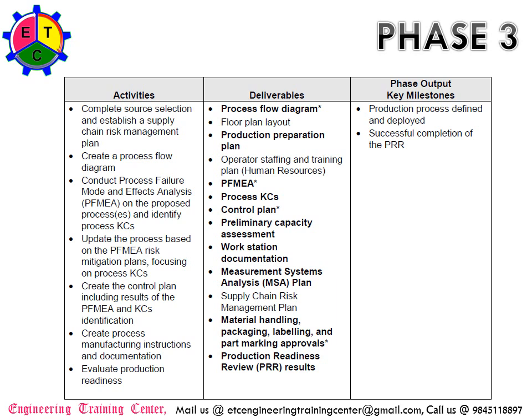The major activities here are completing source selection and establishing the supply chain risk management plan — addressing whether we have sufficient risk-free resources and where sourcing risks are addressed. During Phase 3, you will create the process flow diagram, and once that is in place, conduct the PFMEA on the proposed processes. You will identify the key characteristics within the PFMEA, and update the process based on the PFMEA risk mitigation plan focusing on those key characteristics.